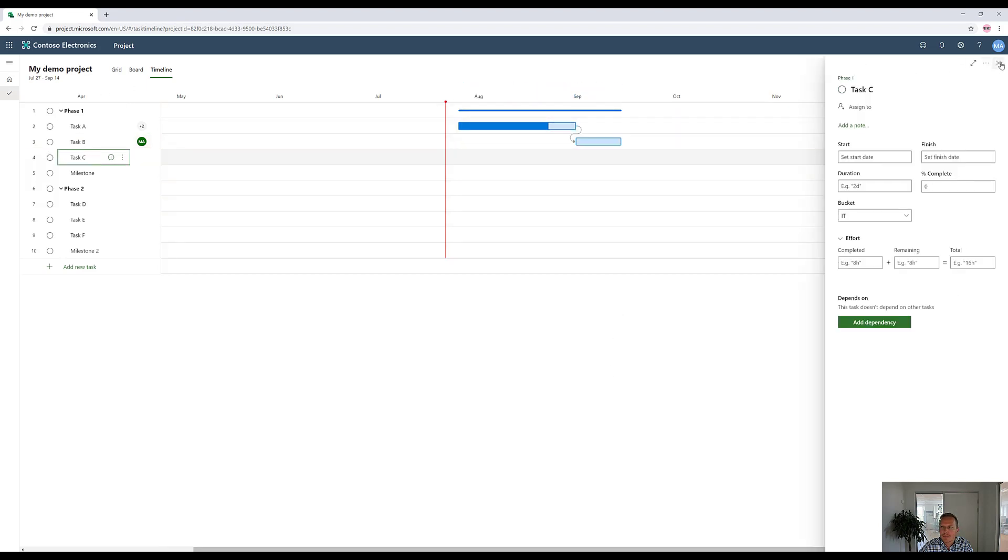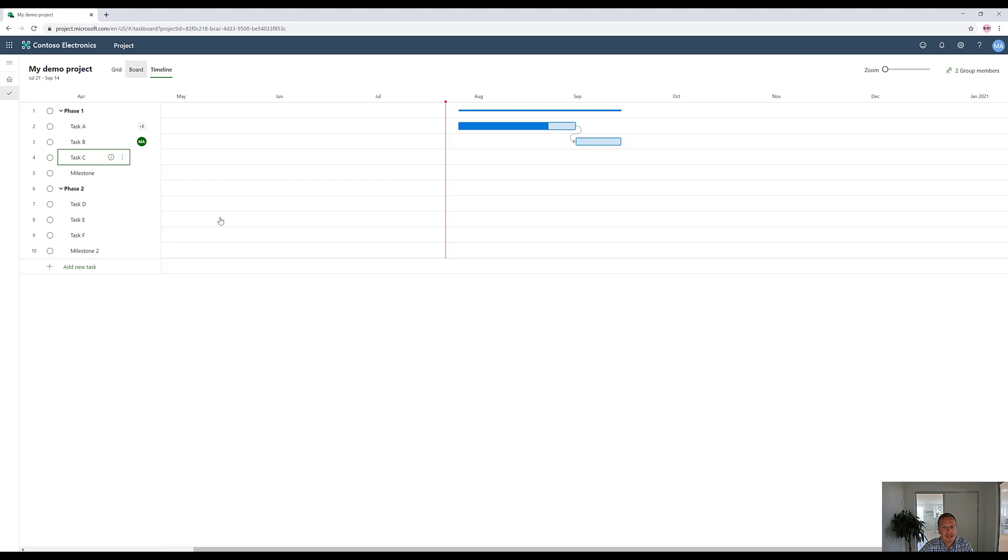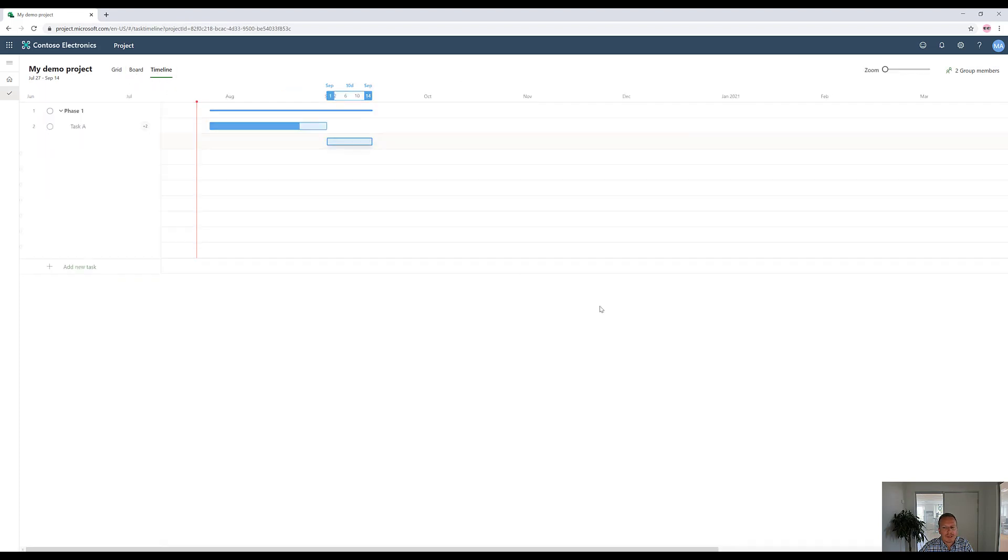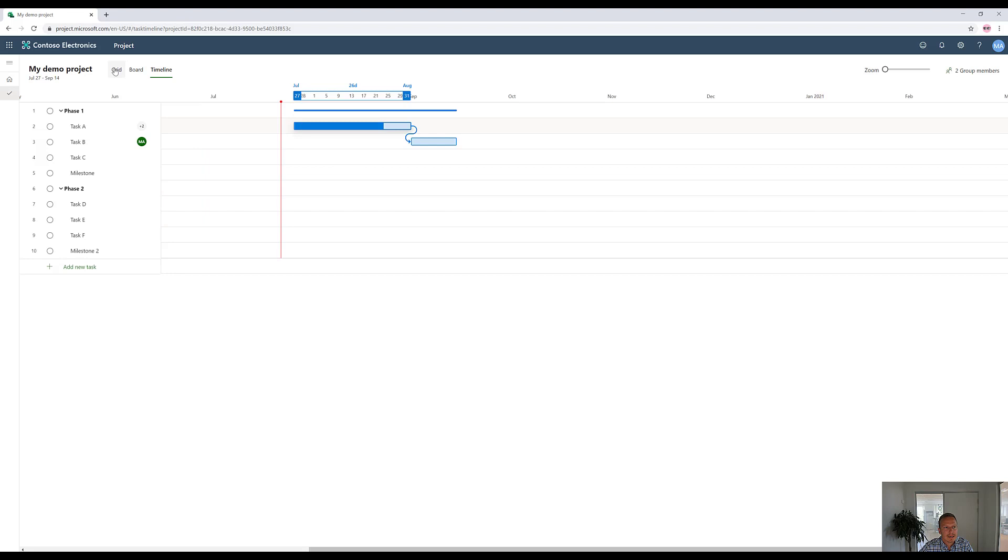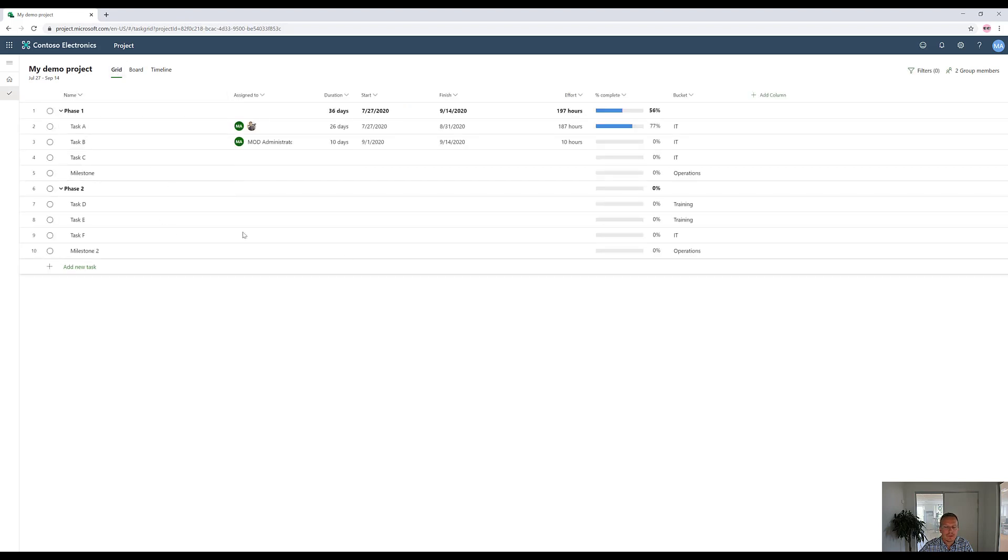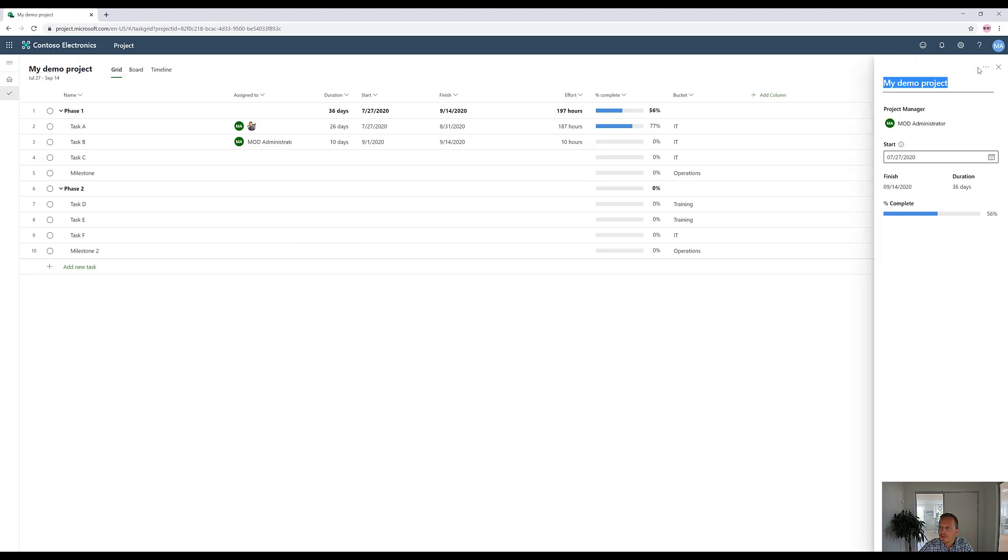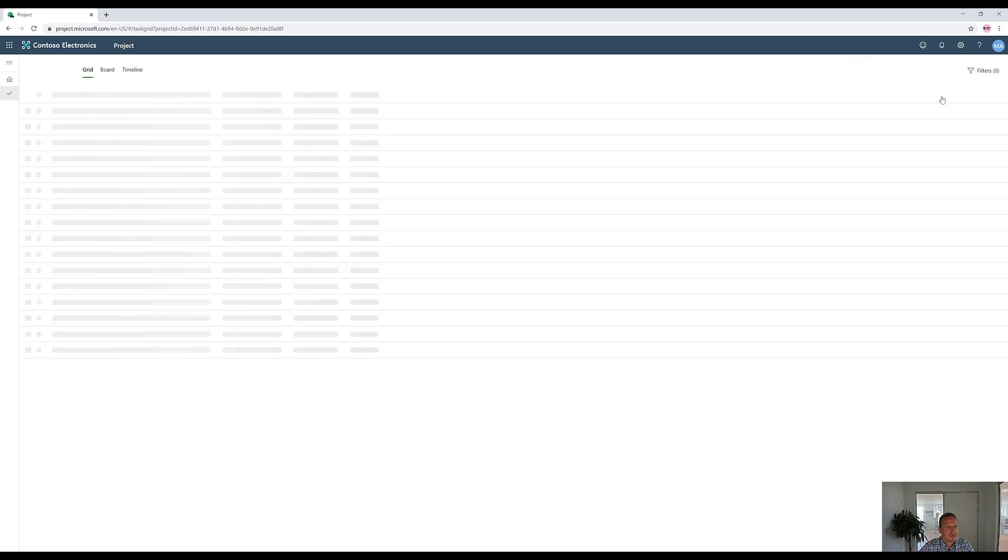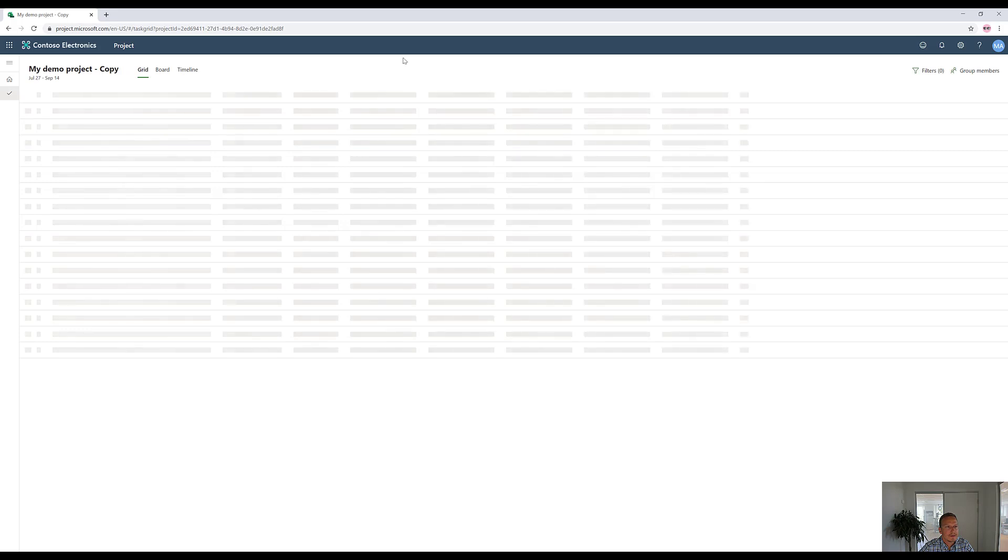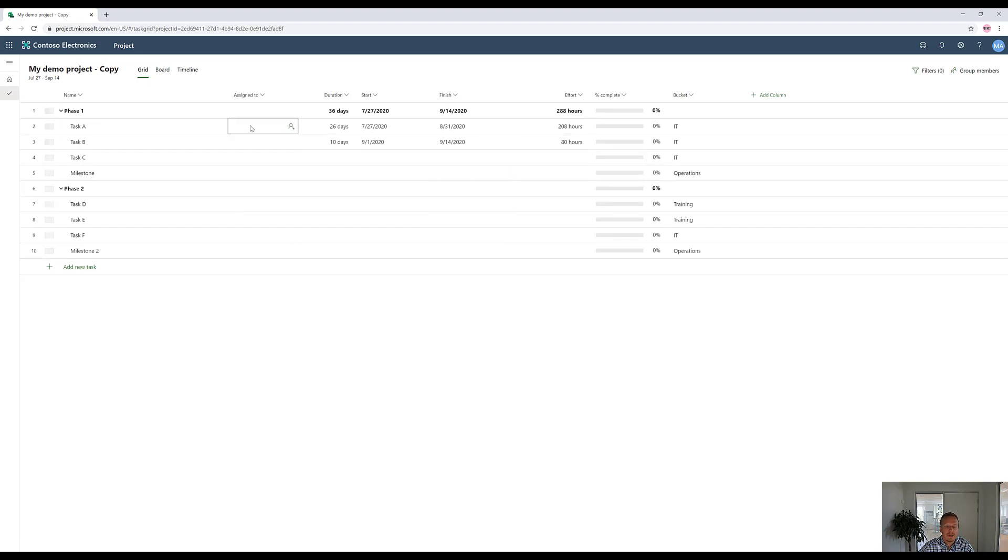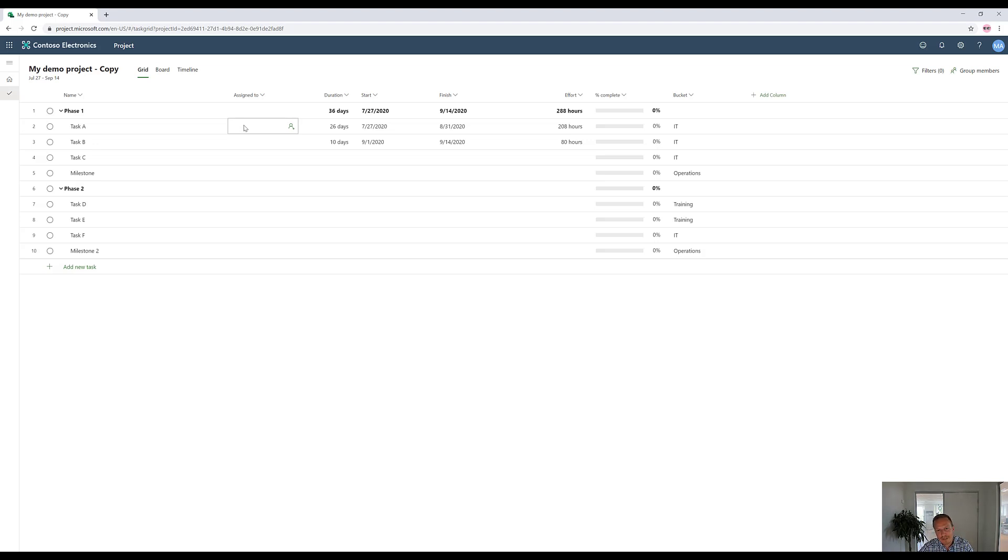So no matter where we want to plan, if we are planning Agile, like a Kanban approach, tracking it through a Gantt chart experience or something that looks like a SharePoint list or Excel, we can do that. And everything relates all together. That's a simple way of showing how Project for the Web works. Now, if you wanted to copy this project and reuse the information, you could essentially just click here, go to the three dots up there, and click on Copy Project. This creates a new project just with a dash copy after it, but keeping the same information except for one thing, which are your resources. Because there is a security group behind all of these projects, we do not want to copy all the group members when we copy a project plan. So it's a template without the resource information.